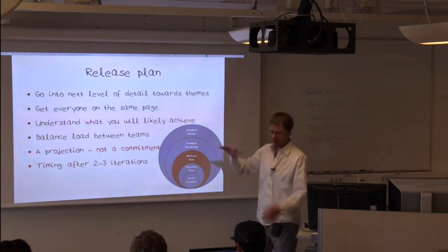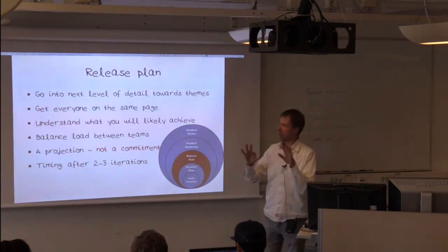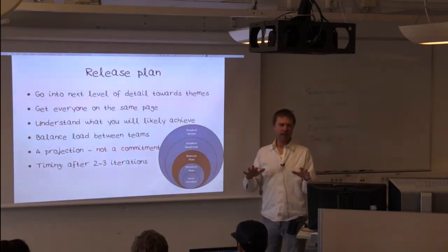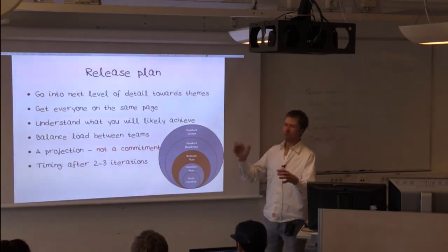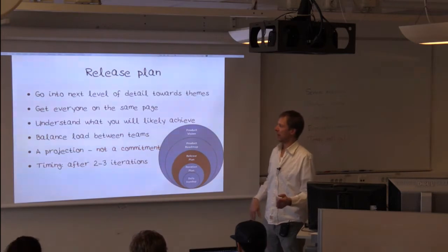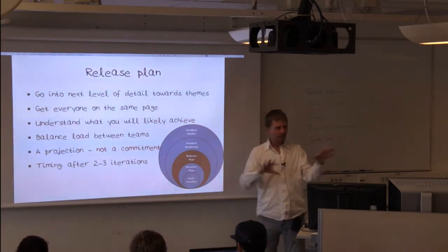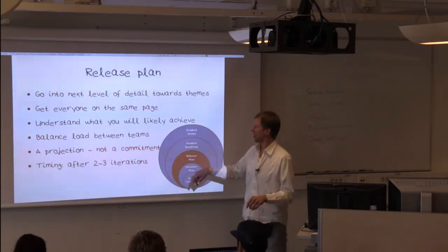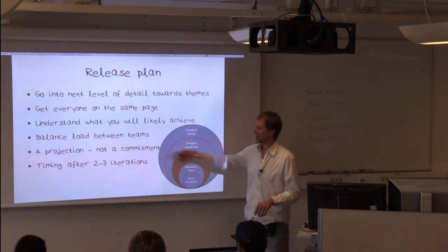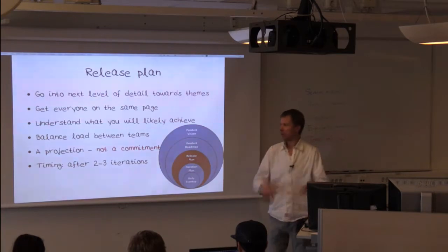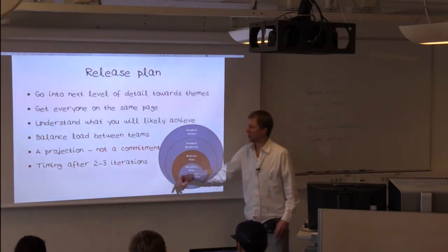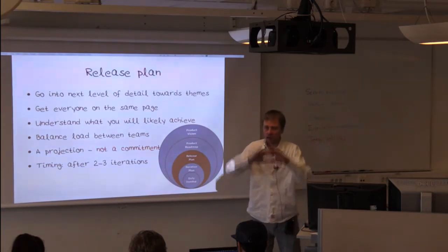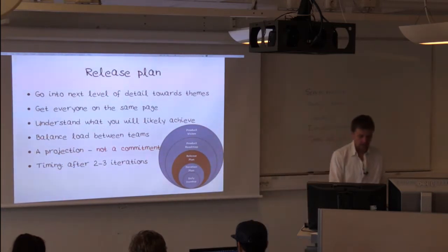So here, we want to make sure everybody is on the infamous same page. Get some understanding what can possibly be in this release. You balance loads, you might have different teams, you might balance those. And you're projecting, essentially, what's going to be in the next release. There's no commitment from anybody. We're just projecting it. And you do this after a few iterations, once you are up to speed, so you know kind of how things are going.